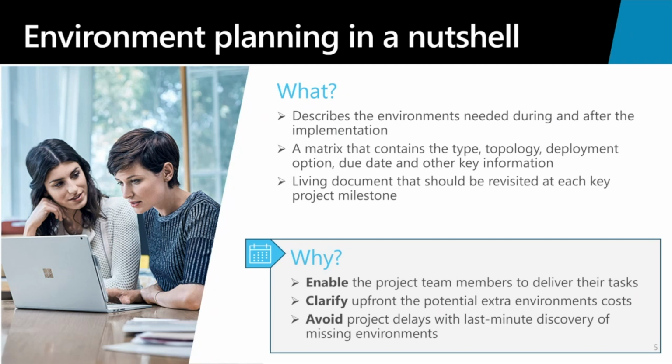The environment plan is also important because it helps clarify the upfront and potential environment costs. If you plan those environments well in detail upfront, then you'll know exactly what those costs are going to be throughout your project and when those additional funds are going to be needed. It's not uncommon that people don't plan appropriately for those environments that are needed just before go live for training and performance testing, or even up at the beginning for data migration.